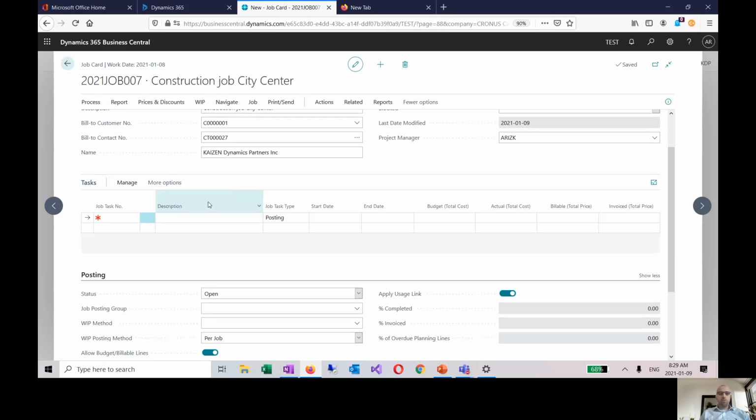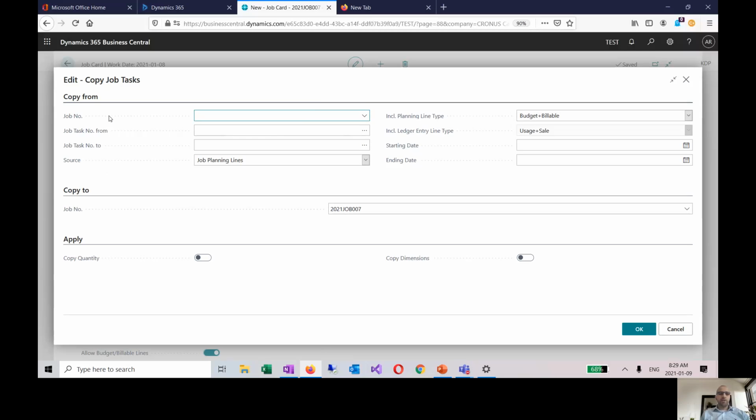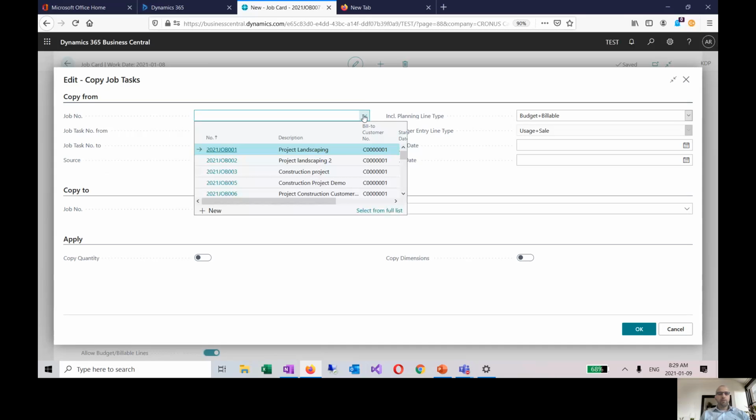Now, as in a project, there is a work breakdown structure, and normally it should be material, expenses, subcontracting, and so on, or the work breakdown structure for any projects, either for service, construction, or field, or maintenance, and so on. But we know that we could create it from other projects that we used in the past, if it is just like the same projects, or we could have some specific templates, like, for example, for commercial or residential. So I'll pick the first one.